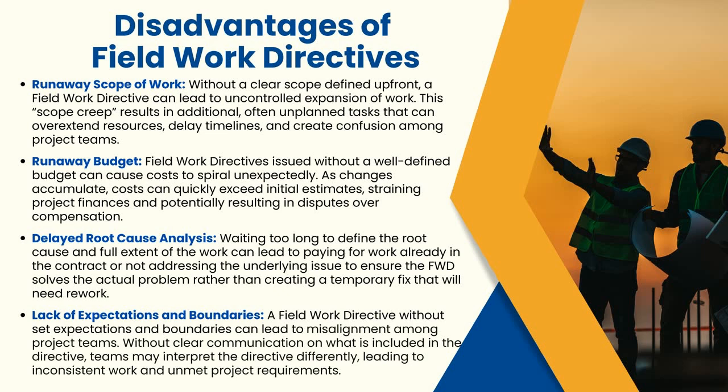And really, most importantly, what it does is it steals the opportunity from the owner who's paying for the project to be able to determine if they wish to continue moving forward in this direction or if they want to redirect. And so it's very important that the contractor give the owner that option, because they are the ones who are going to be paying for the work, and therefore the owner should have input on how that work is taking place.